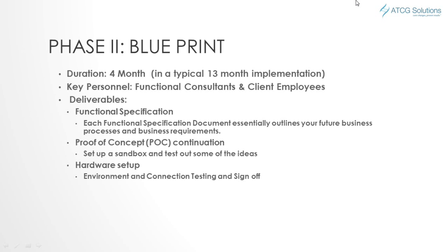Proof of concept continues. At this time, functional consultants will find out more about the business requirements, and they'll continue testing out some of their ideas in the sandbox. Hardware setup. At this time, the environment should be set up, the connectivity should be tested, and a sign-off from the functional consultants should be complete.